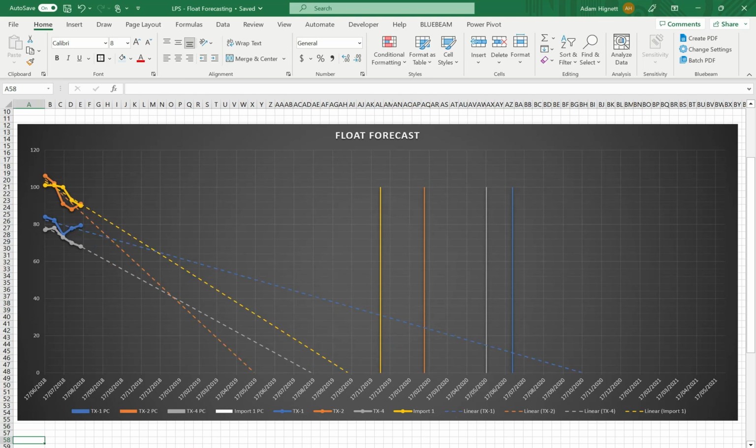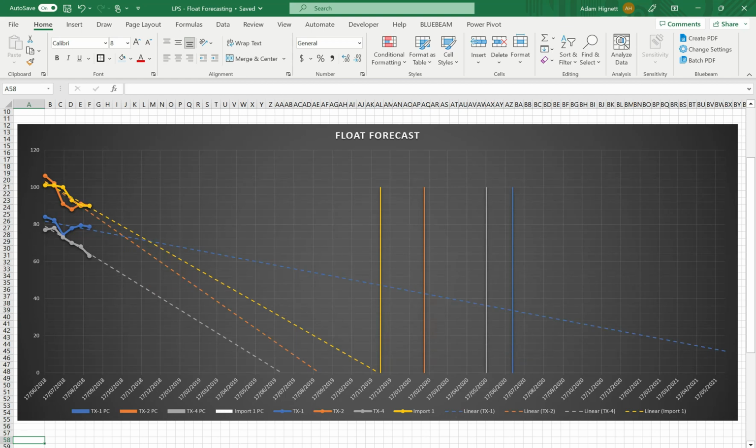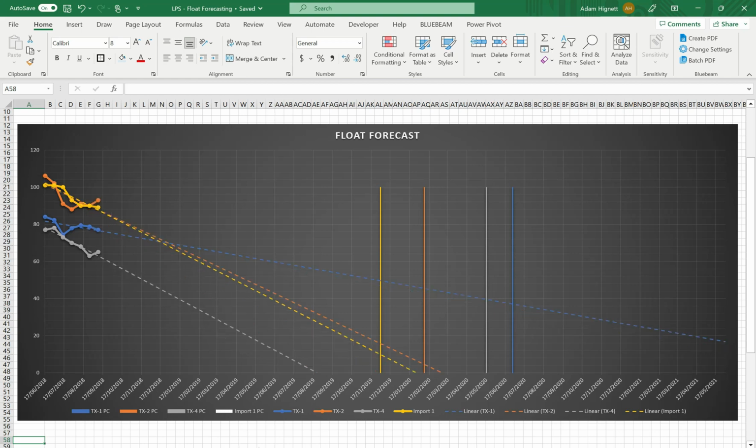Most of the attention quite rightly goes to the critical path because this likely determines the completion date or the sectional completion dates, particularly in larger and more complex programs. But when things start going wrong, as they inevitably do on most projects, the easy way to maintain the end date is to reallocate your resources and effort from non-critical works over to the critical works to maintain critical production. However, you can only do that for so long before it catches up with you.